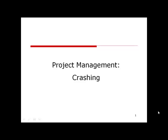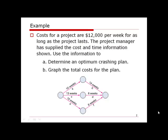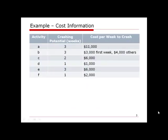We will introduce how to do project crashing through an example. We have the cost information for a given project where the cost is $12,000 per week. We are given the activity relationships, duration of each activity, and on the next page the crashing information. We need to determine the optimal crashing plan and calculate the total cost.